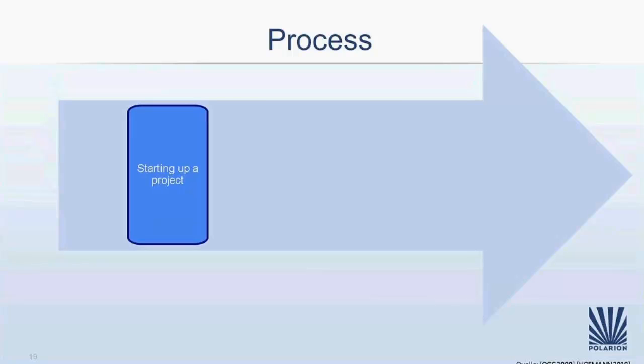About the processes, you will see if you're doing a project, you might already know these processes and you might already work on them. Before you start with a project, you need to define your business case. So you're starting up a project, you define a business case. You decide who is part of your project management team. You define what kind of phases you will have. And of course, you will ask your customer if you can start your project.